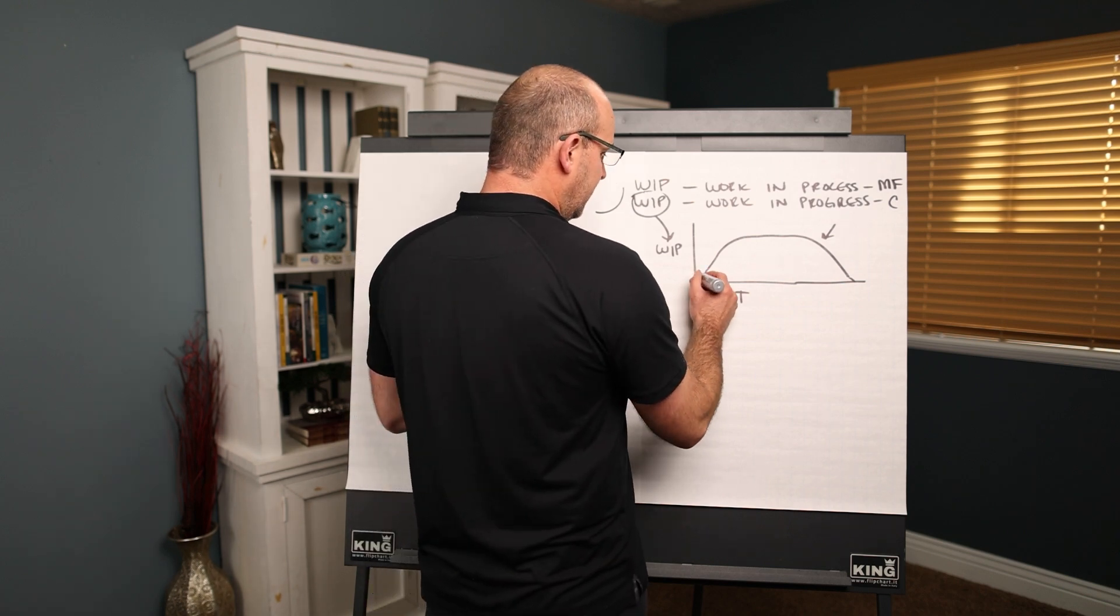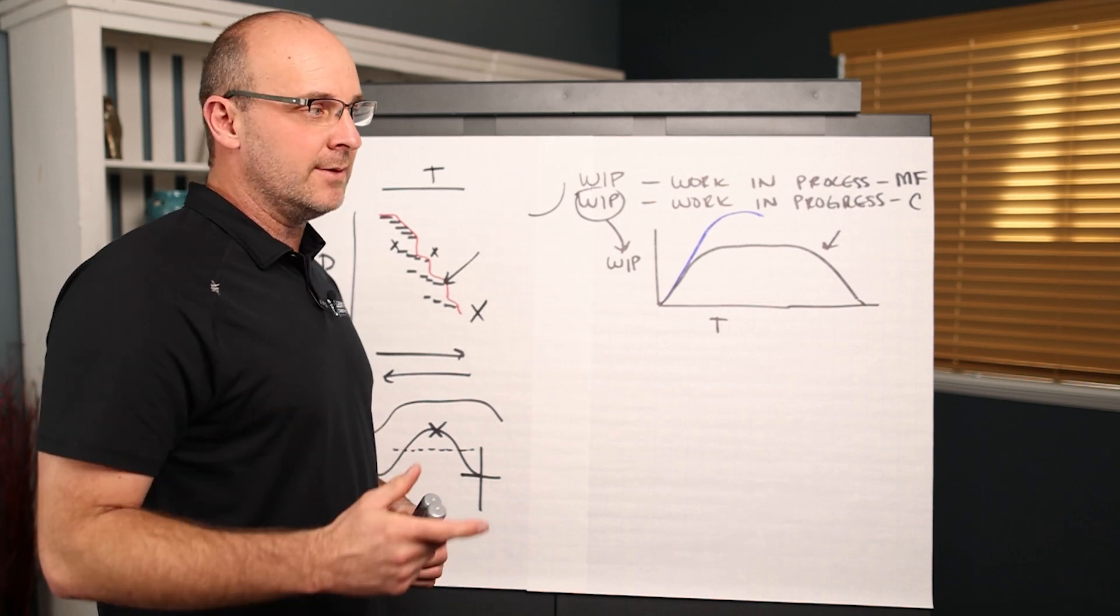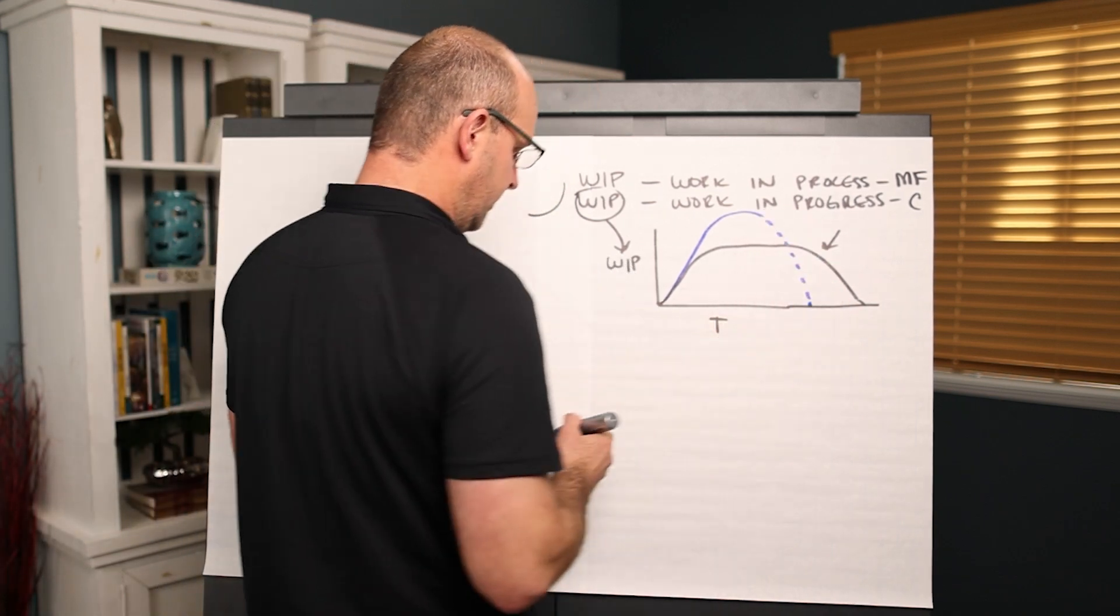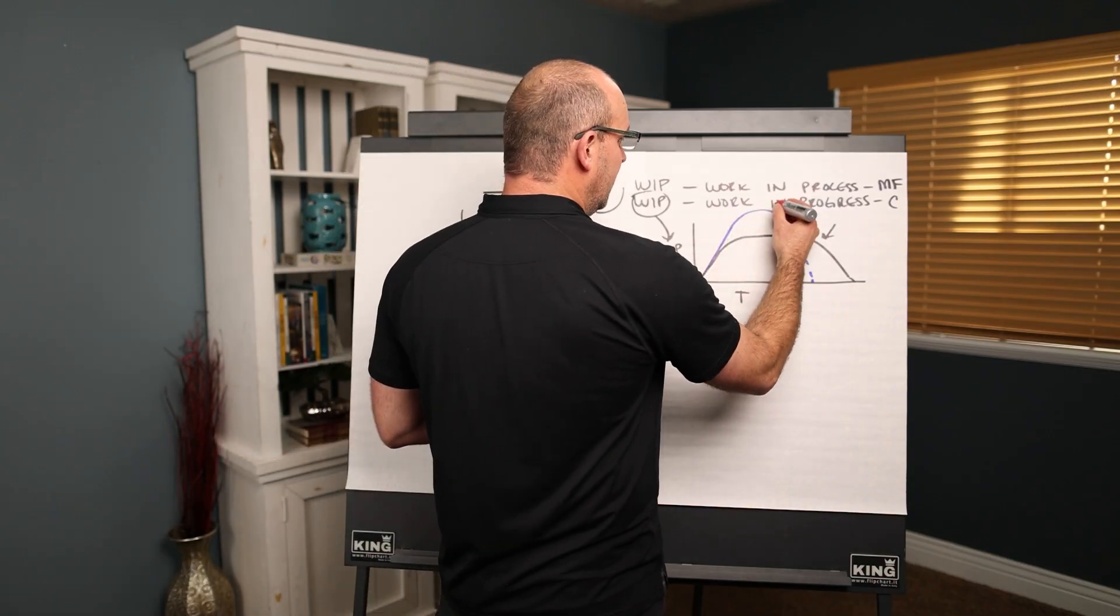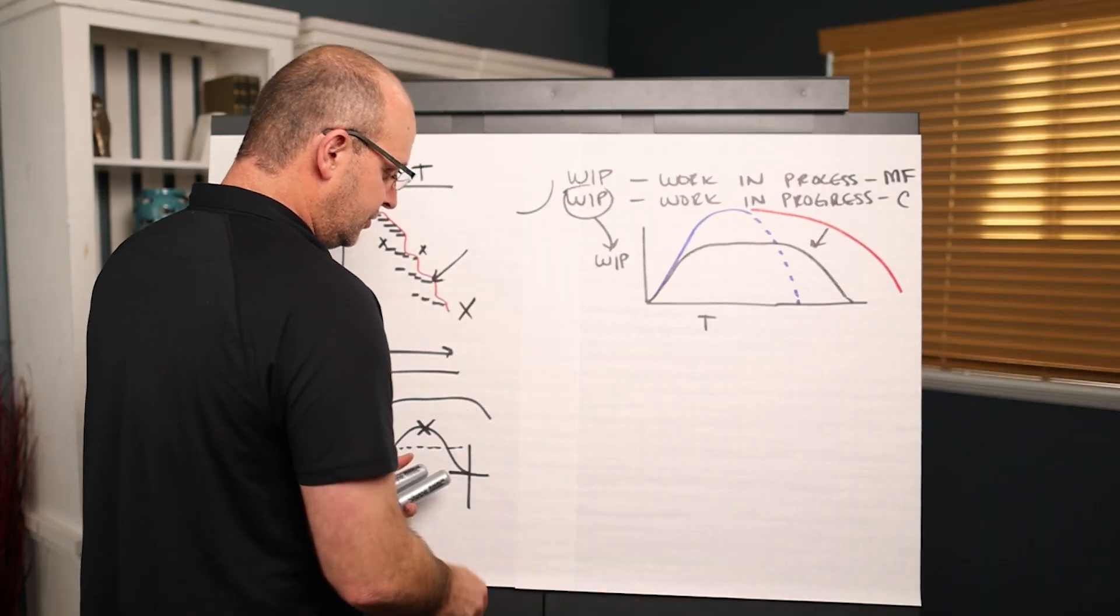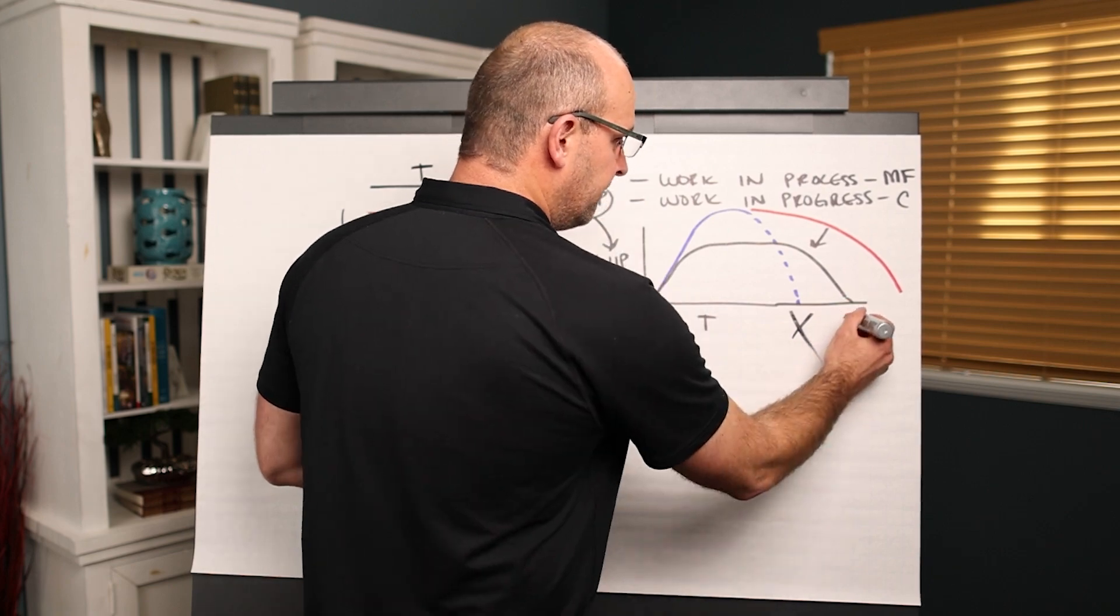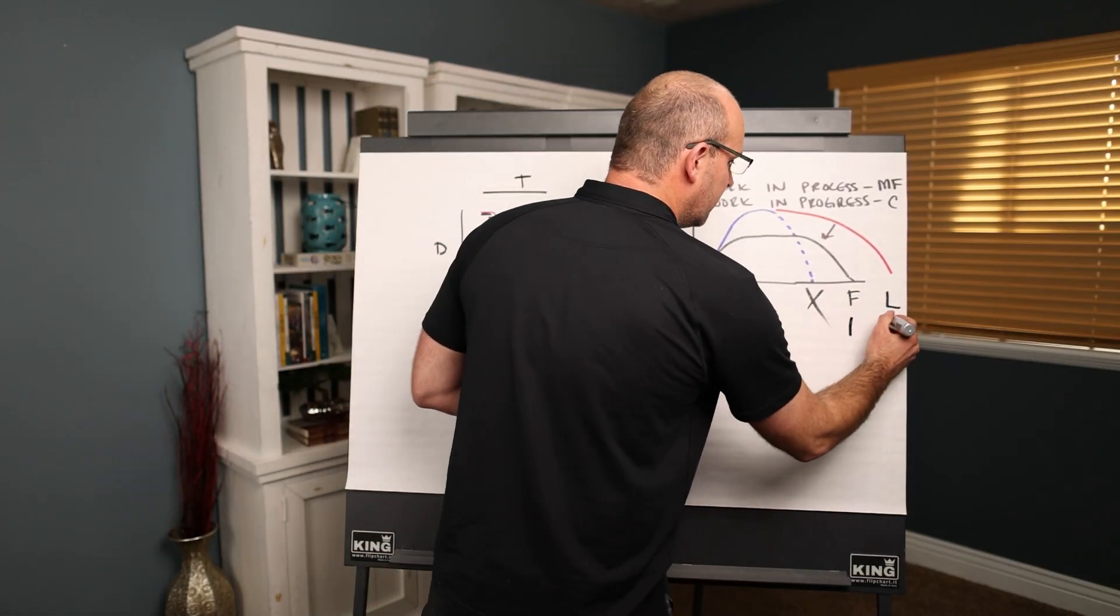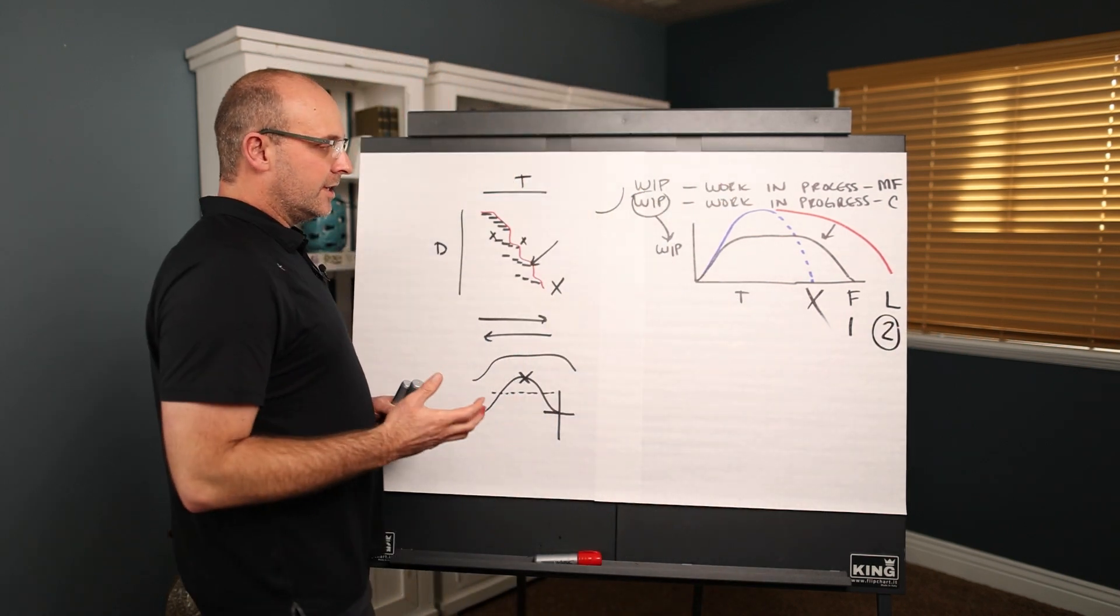Hey, owner, contractor, you should tell your trades to do more work than they're able to do. And people think mistakenly that's going to get us finished sooner. That's not what's going to happen. What's going to happen is you're going to enter into a downward productivity spiral, and your project is going to finish late. So you do not have the option of finishing sooner. You can finish on time, or you can finish late because you're pushing. You only have option one or option two, and I think option two is stupid. So let me explain to you what happens here.